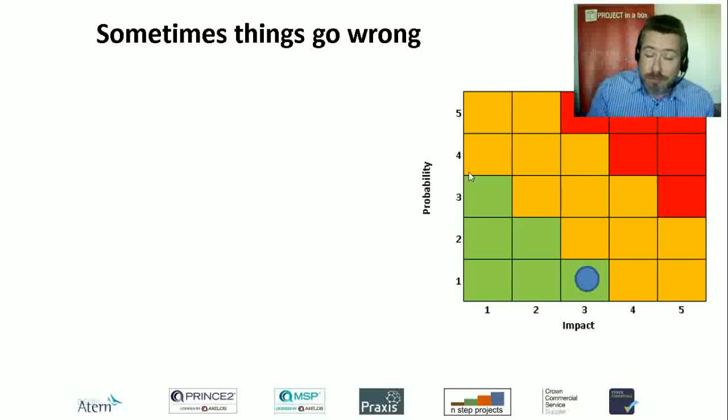And when the risk happens, it becomes an issue. So it's moved to an impact there, and then it's slid straight up. We might think about it this way, to be certain, because it's happened now, and therefore it's above a 5 probability, it's a certainty. Now hopefully when it actually happens, the impact is what we anticipated it to be when we were estimating it.